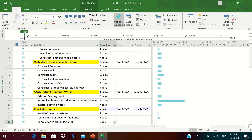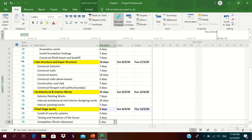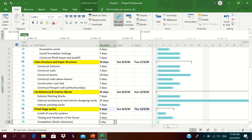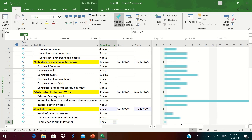For one-day activities we cannot see the activity bar — they can be inserted as milestones. If we want to see them we need to zoom in to the level of details. I will show how to change an activity to a milestone later.